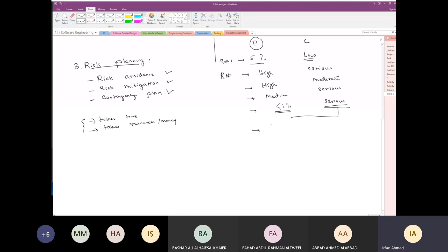Similarly, the probability of a risk may be very high, 90% that it is going to happen, but the consequence is highly insignificant. So you say, okay, that's not really worth planning for. Make sense? So only because a probability is very high or the consequence is very serious is not just a reason to add them for planning. But naturally, those with higher or moderate possibilities and serious or moderate consequences are more important candidates you're going to plan for.